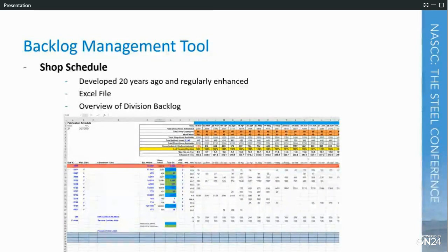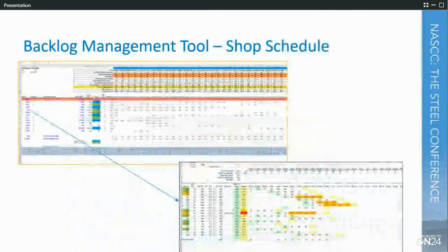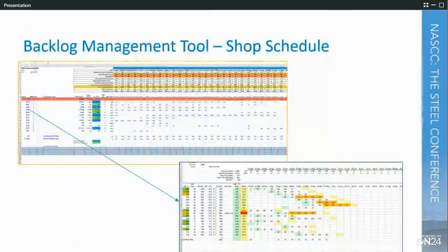But to get to more detail, each of these projects will end up having an individual project tab schedule within this document. And that's what's feeding that main dashboard. So you had projects 1, 2, 3 showing that I'm going to work 200 hours this week on that specific project. But where that information comes from is we're defining it down to the project level specifically here. So once our project managers kick off the project, the schedule is defined, and the sequencing for that project is defined, we'll then create the specific project tab.